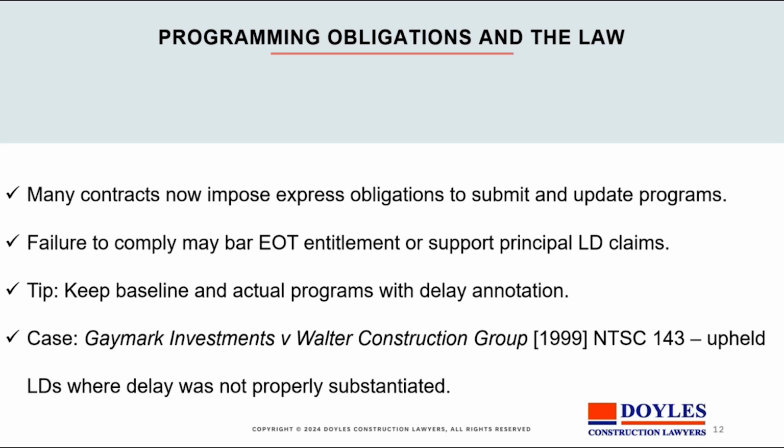Again, in this case of Gaymark and Walter Construction is an example of where LDs were imposed because the delay was not properly substantiated. We'll talk again of substantiation, but it's important, first of all, to make sure that your program is clear and that you can identify your critical path and that you can show that delays related to the critical path.